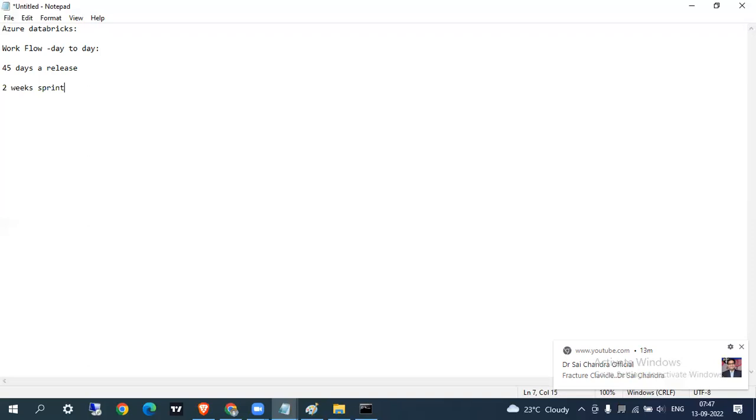We have to give proper explanation for that. They will be considered. So you need to explain to the Scrum Master these are the roadblocks. Currently, you didn't tell him on the last day. In the day-to-day meeting only, you say there is a roadblock for this item, so I need to get those inputs. Still I was waiting for this access. Prior to that only, you need to tell the Scrum Master. So he would be having an idea.